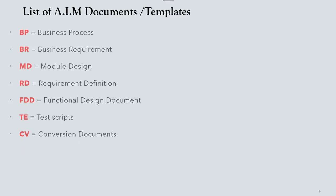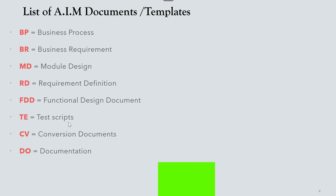CV is the Conversion Document — data conversion is the process of converting or transferring data from a legacy system to Oracle Applications. For example, transferring customer records and supplier records from legacy to the customer master or supplier master. DO is Documentation — prepared per module and includes user guides and implementation manuals. The key difference between DO and TE is that DO as a user guide must include screenshots, while test scripts sometimes do not include screenshots. This is also a common interview question.